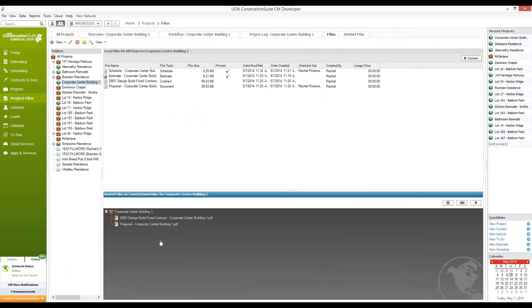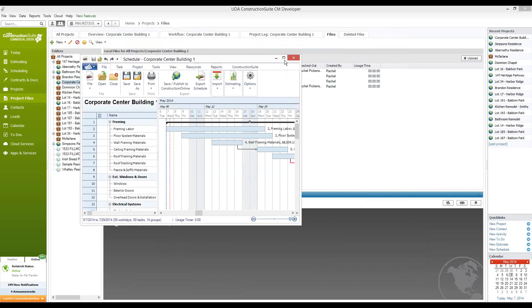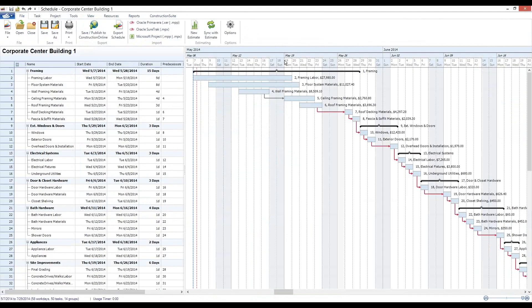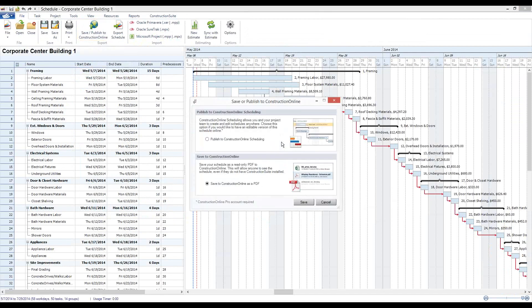The schedule uploads are really neat in that they offer you the ability to take a schedule created in Construction Suite's On Plan Scheduling program. We've got a nice schedule created for Corporate Center Building 1 using On Plan Scheduling, and now I'm ready to upload it to Construction Online so that my team members can make changes from the field. To do so, you simply click Save or Publish to Construction Online, where you'll have the option to either publish to the Construction Online scheduling tool — which requires a Construction Online Pro membership — or upload the schedule as a PDF copy so you can view it from a mobile device. We'll choose the first option to publish to Construction Online scheduling.